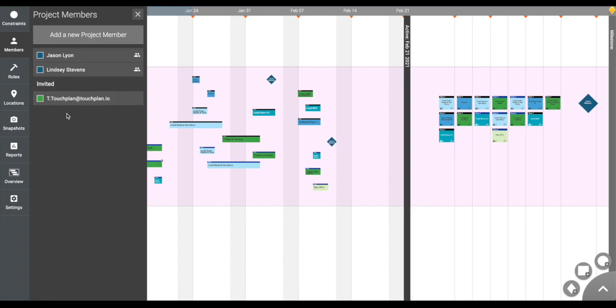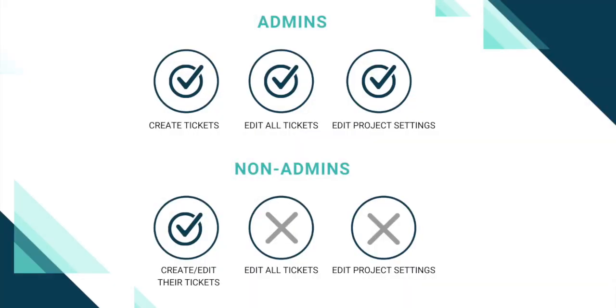While trade partners would be listed as non-admins. It's important to note that non-admin users who have been assigned a particular role only have access to create, edit, and move tickets in that assigned role color.